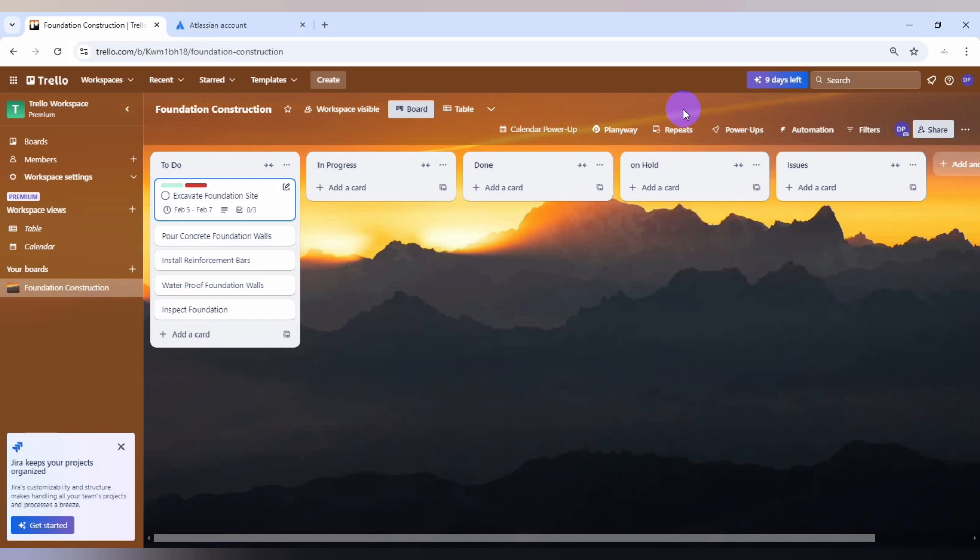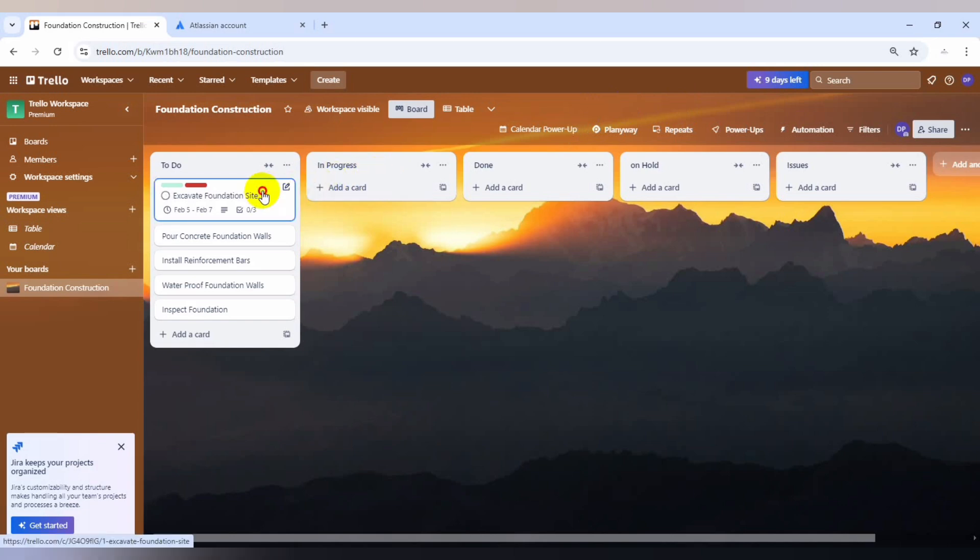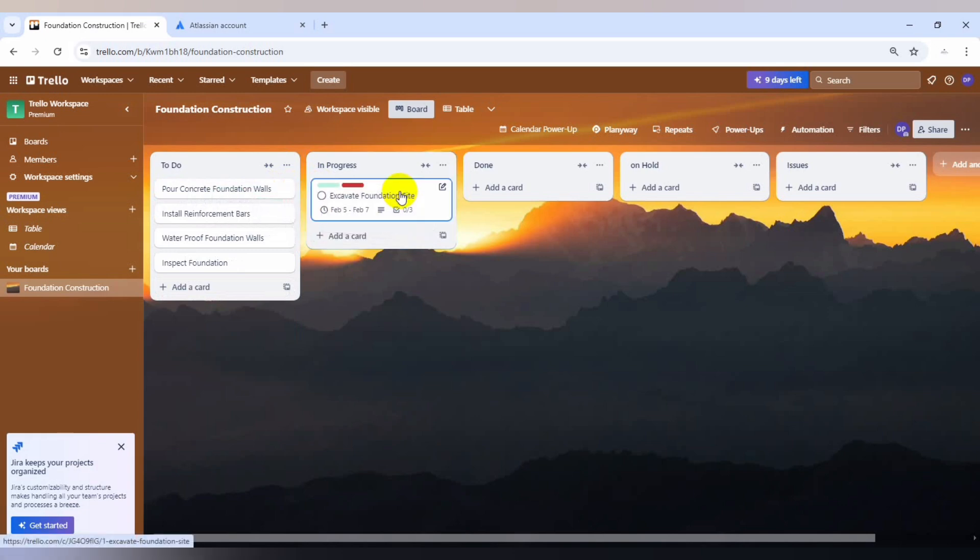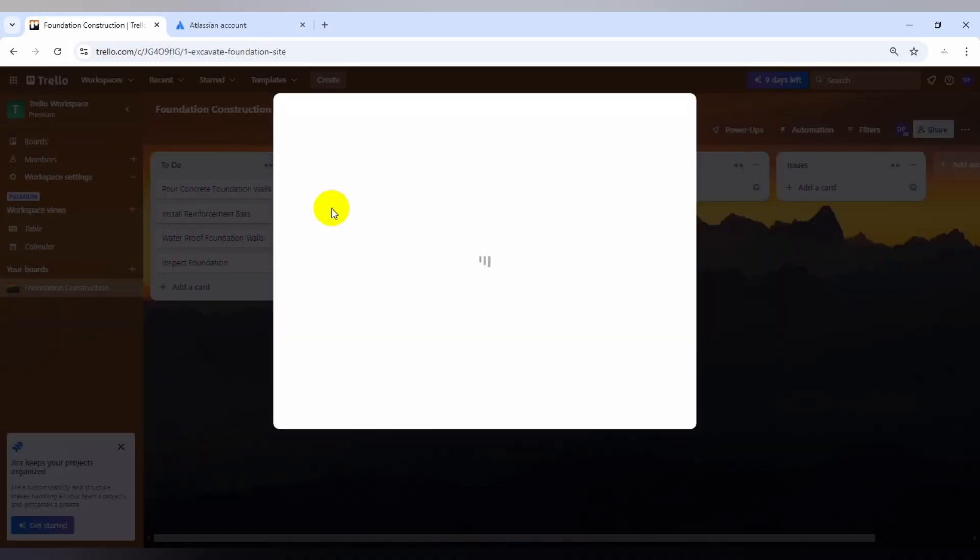Now we'll just be looking at when should we use these cards in progress, done, on hold, and issues. You're to use in progress when the project starts. You use it when the excavation team has actively started working on the site. For example, if the crew is on site and excavation is currently taking place. You are done when the excavation is completely and it's clear of debris and obstacles, as we've stated here. The site is clear of debris and everything.